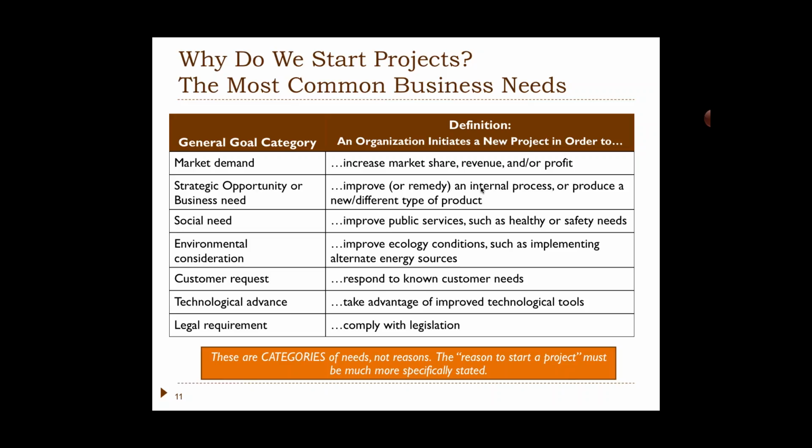Okay? And just so you know, when you're doing a project, please do yourself a favor. As you're getting your project started, the first thing we often want to do is go to our users and say, all right, so what is it that you need us to do for you? Okay? I want you to change that. From now on, as soon as you get a project, I want you to go to management, and the question you need to ask them is, why are we doing this? What's moving us to do this? Is there a market demand? Is there a social need? What's going on? What are we hoping to accomplish? Now that's critically important.